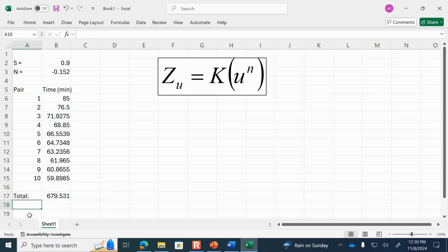It would be a poor estimate just to say, well, I'll have this person do the first pair of pants, and then how long it's going to take is 10 times that. It won't take that much time because they're going to get a little bit better at their task. So this function basically tells you how much better they're going to get over time, and then you could total up the entire order requirements for the whole sequence.